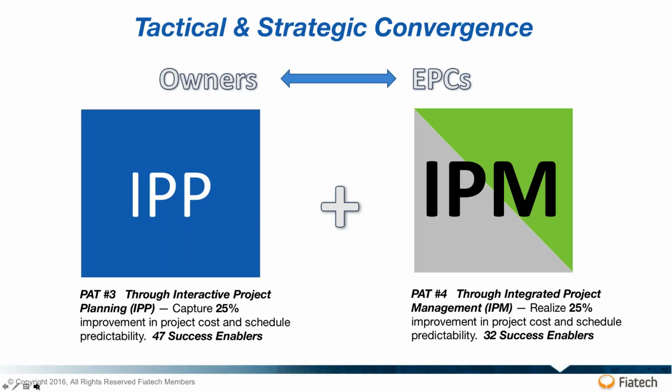And by doing that, you've elevated sensitivity to the overall project objective, the capital project objective, and at the same time you help raise awareness of whose turn it is to deliver things that can ensure the project moves along successfully. As all of us know, easily more than 50% of all capital projects overrun on cost and schedule. The idea behind this is if you get everyone together early, right at the kickoff of a project, you can at least have a chance to define who's going to be doing what and what they need in order to be successful.